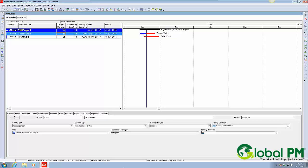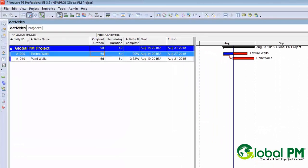Today's lesson has to do with being very careful using a start-to-start relationship. As you can see on screen, we have two activities: 1000, which is texture walls, and 1010, which is paint walls. They're in a start-to-start relationship with a lag. So we're saying that you start texturing walls, then a couple days later we're going to go ahead and get started with painting walls.